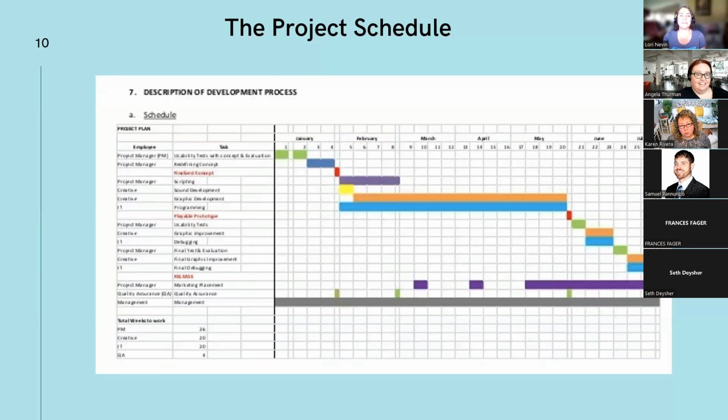Ideally, yes, because you want something in writing that authorizes you to do that. And especially if you're dealing with a customer, or let's say you've got a contract with a subcontractor for some portion of the work that you're performing, you may have contracts that have to be updated, and you want all of that documentation to be properly updated and archived. You need a paper trail for all these changes.